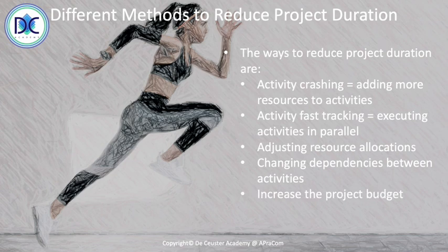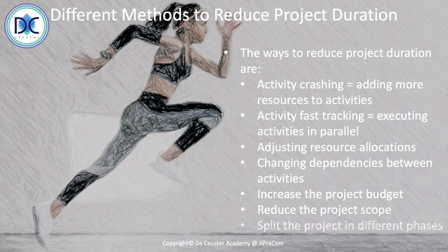We can increase the project budget. We can reduce the project scope. And we can also split the project into different phases, where every phase has an economical advantage and a use, because after that phase, we can already start generating revenues.